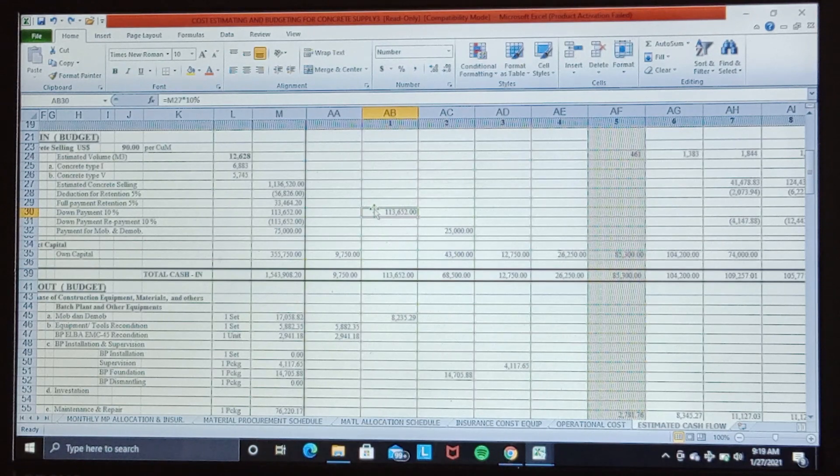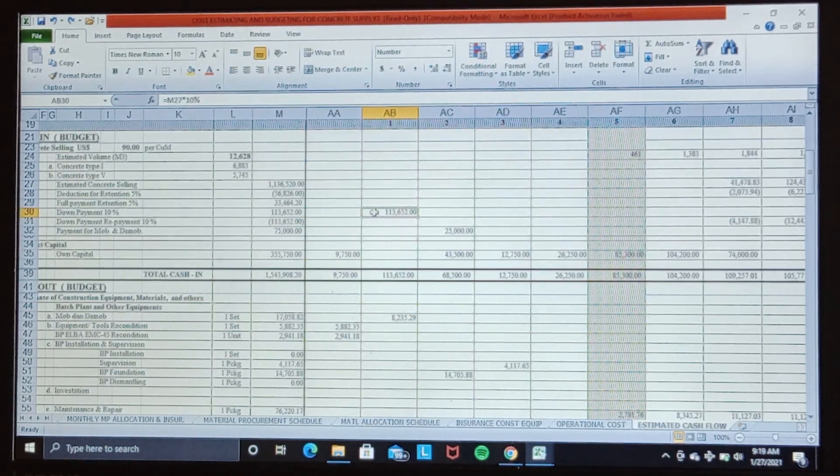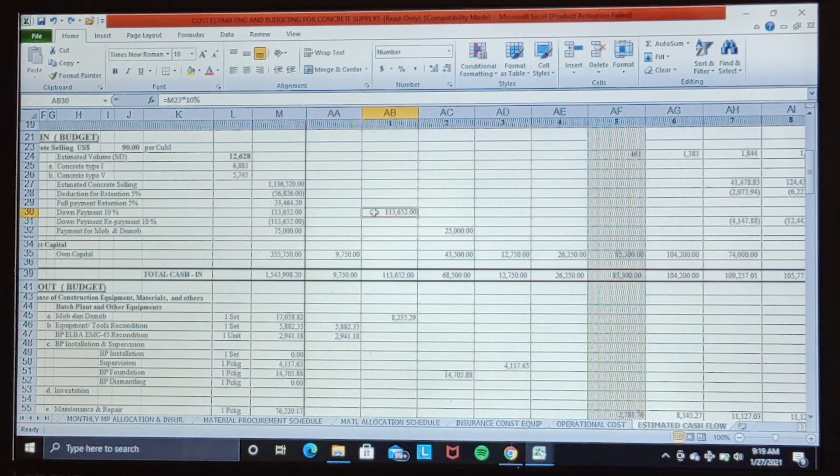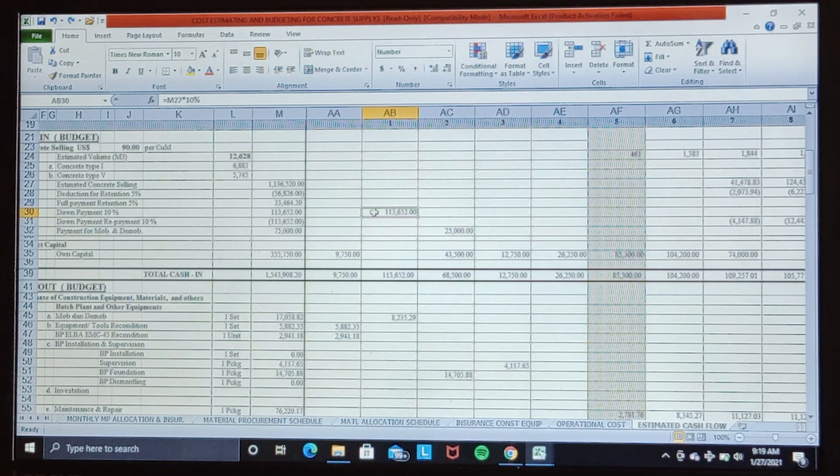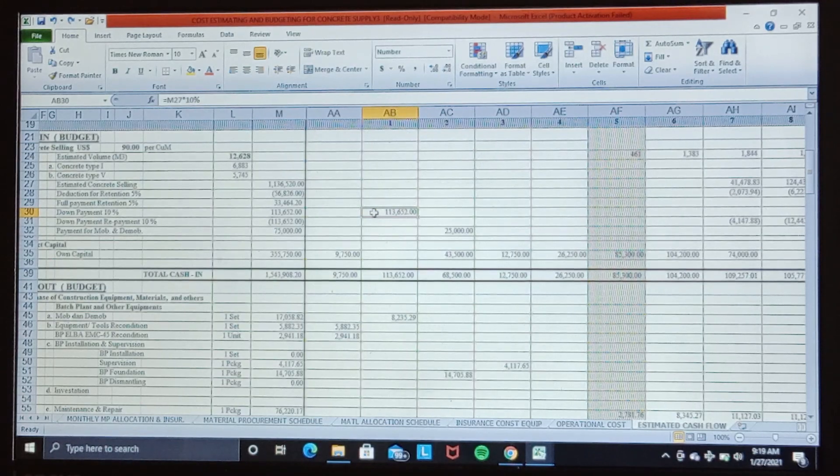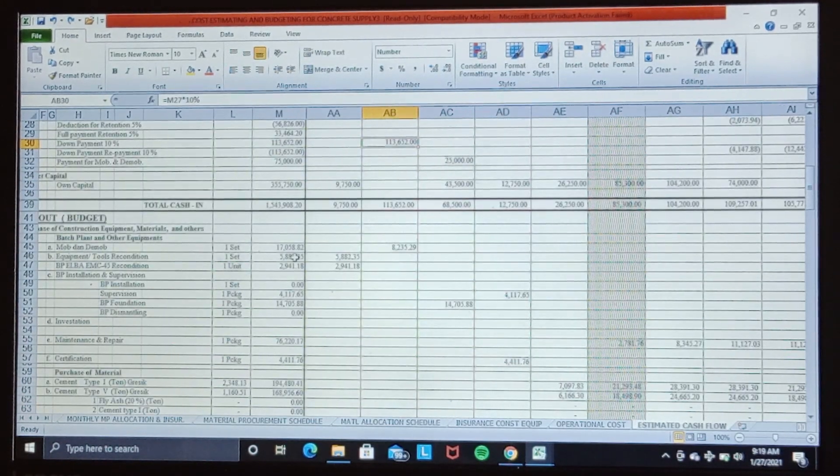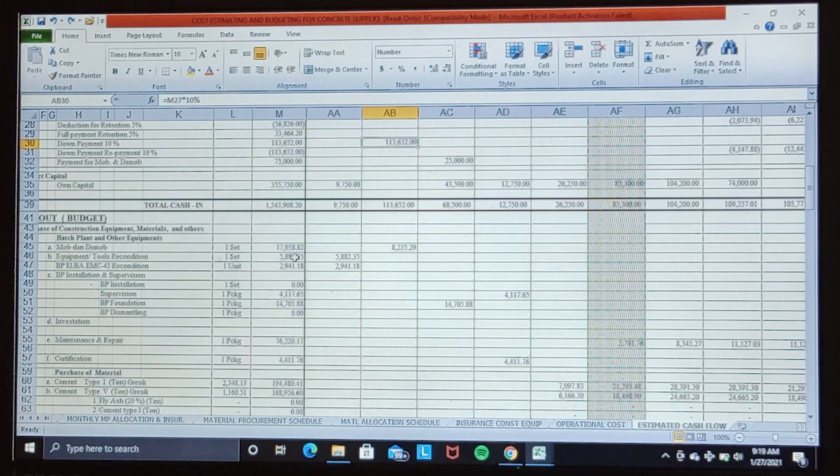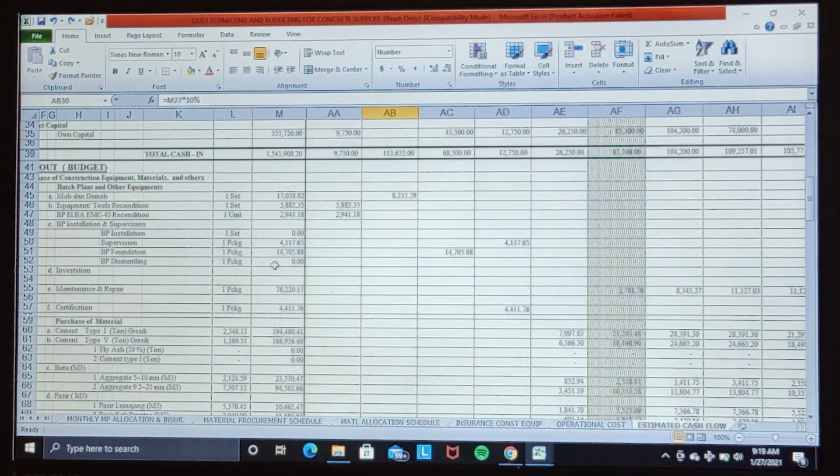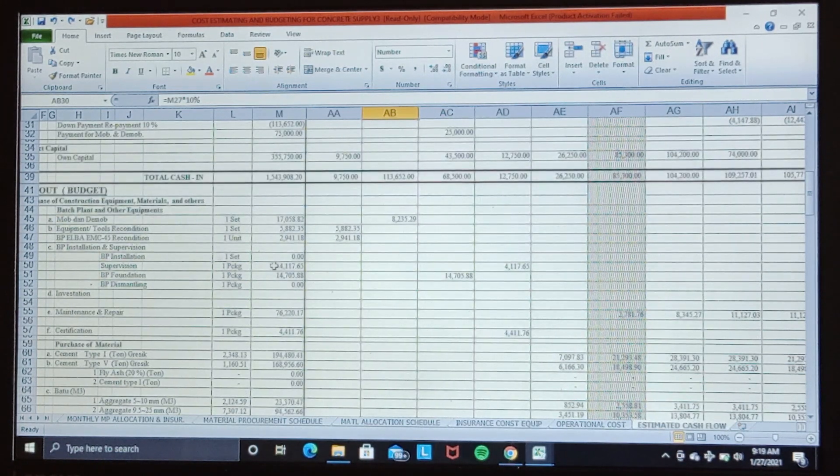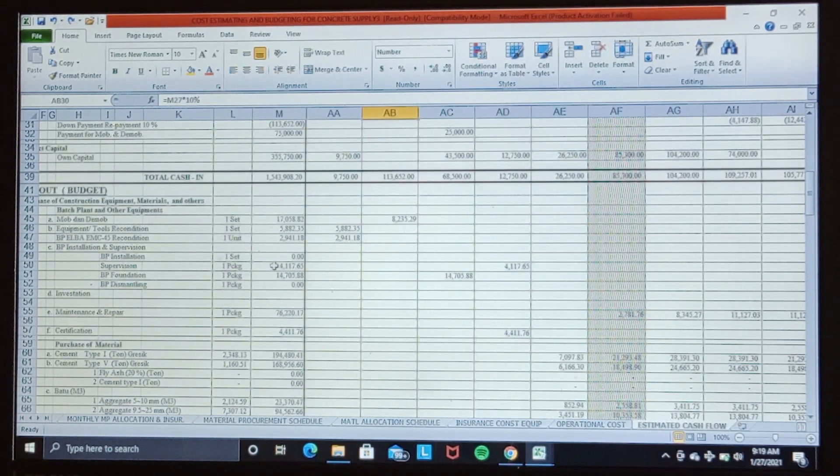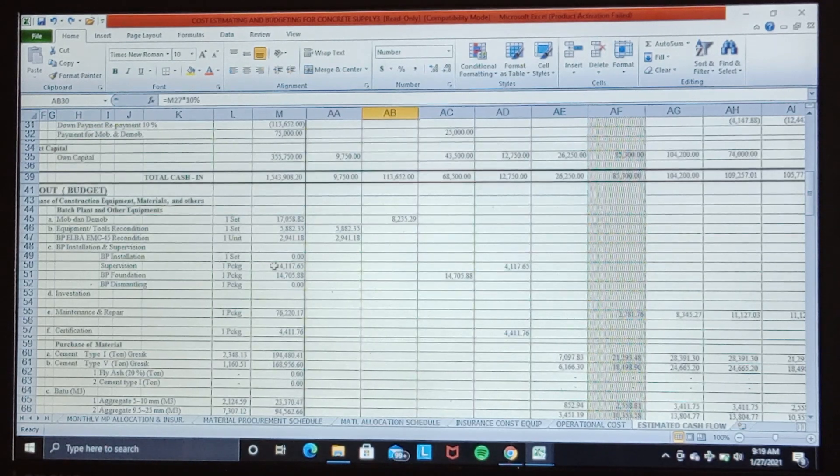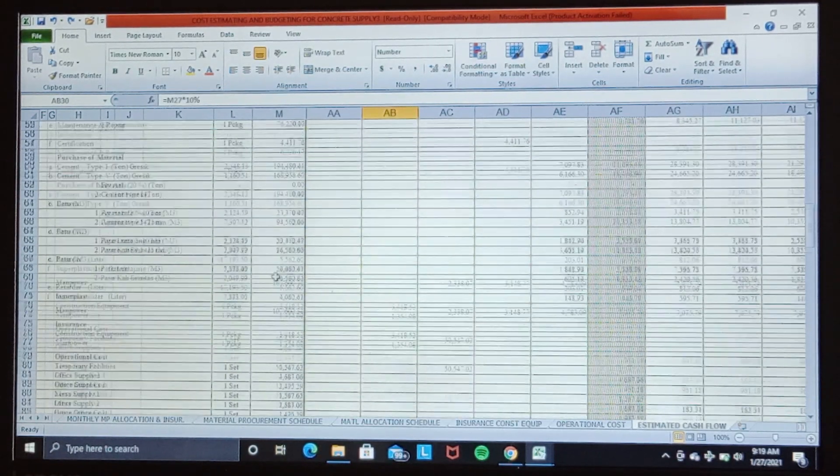Or because of large operational cost requirement at the early stage for site preparation, temporary facilities construction, manpower, material, and equipment mobilization. For this reason we use the company capital to fund the project, but we calculate the company's capital as a project loan.